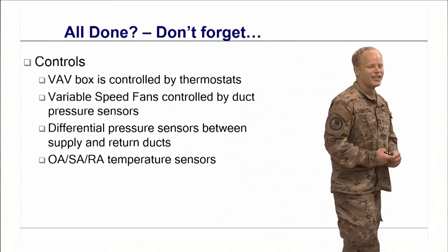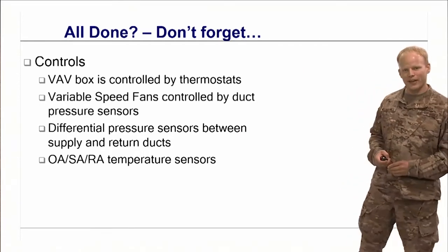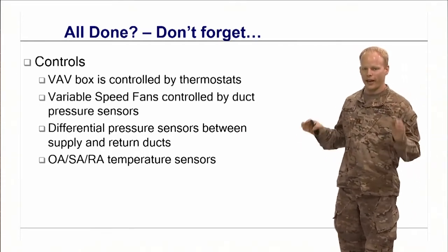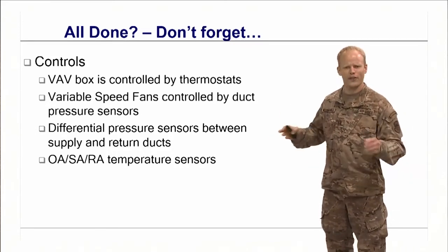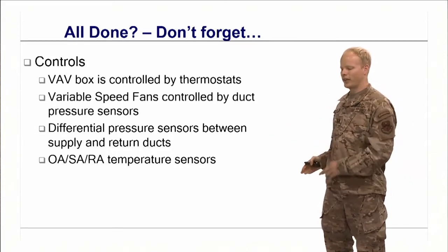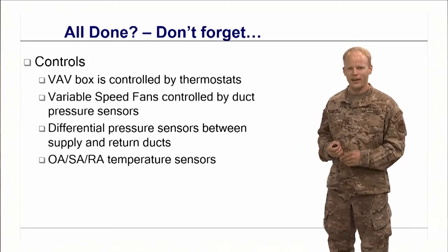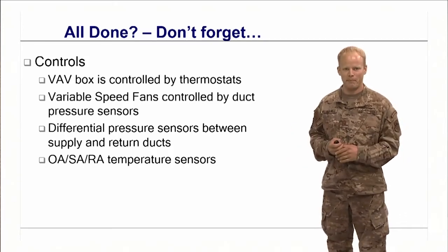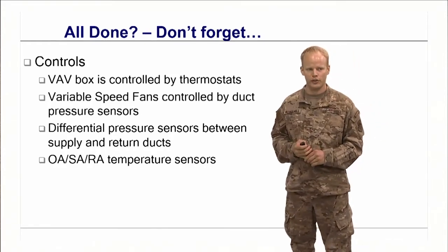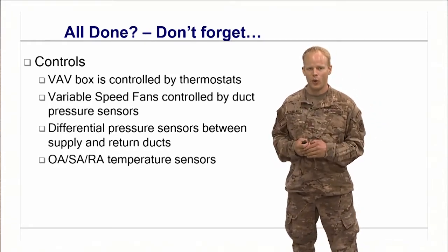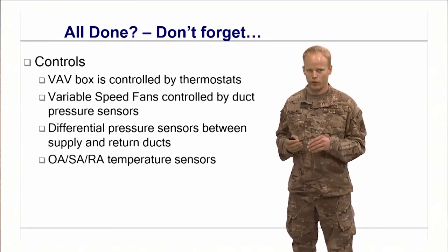No. So at the end of the project, my experience is that what do we like to cut out at the end? The wing commanders yelling at us, turn over the building, the customer's like, we need to use the building now, and at the very end we have testing and balancing. So we need to include our controls. And when we do our cost estimate, we need to include the cost of the controls in here.